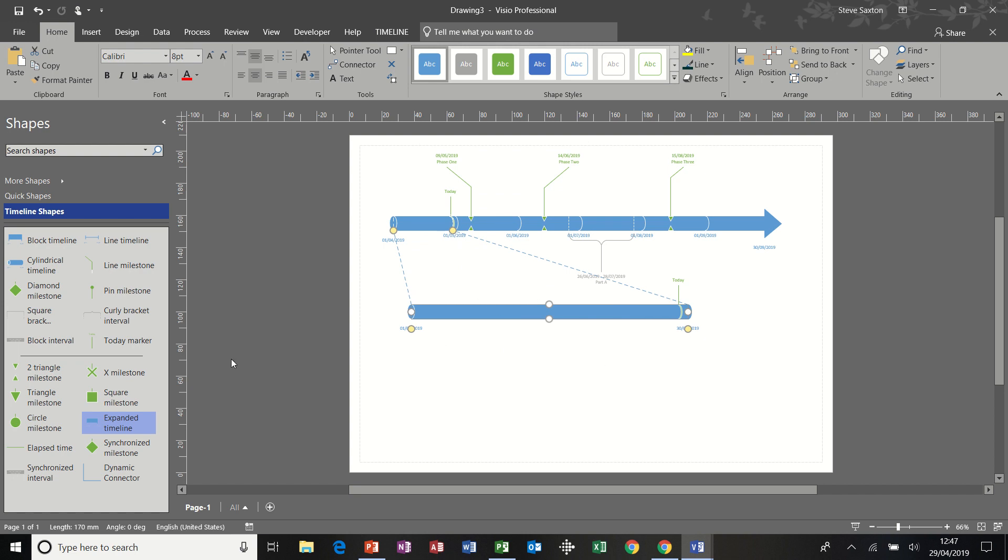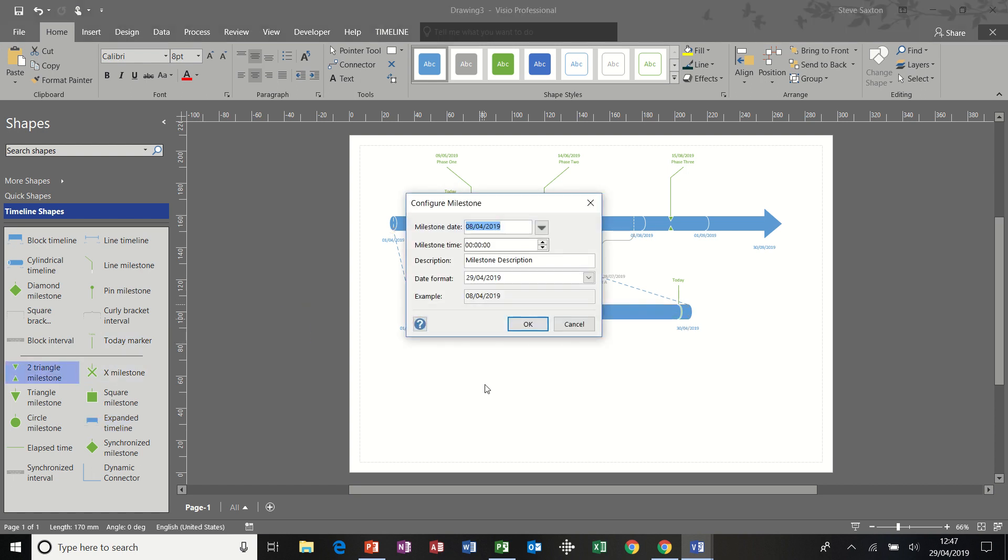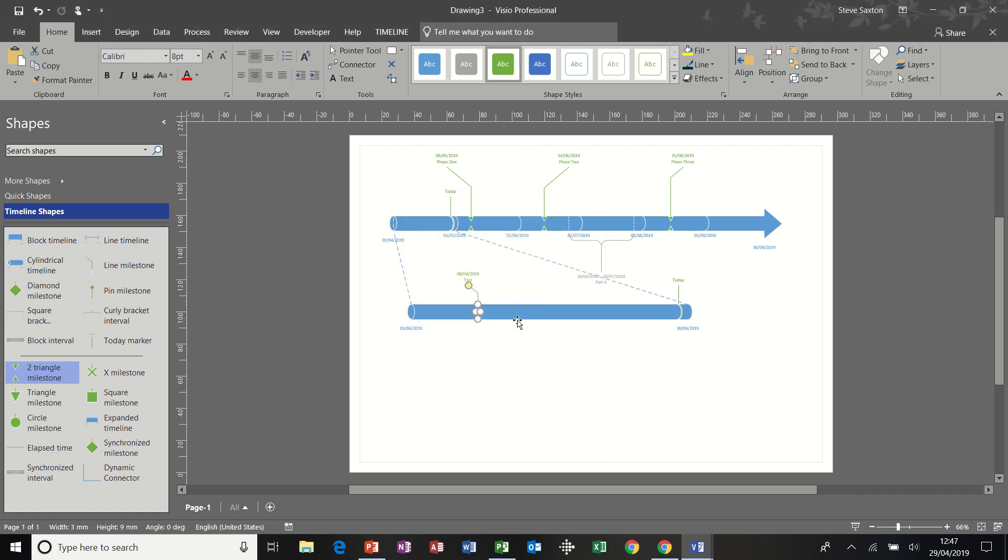Now, if I put a milestone marker on this part, I'll just call this test for a moment. It only appears on this expanded timeline, not on the main timeline.